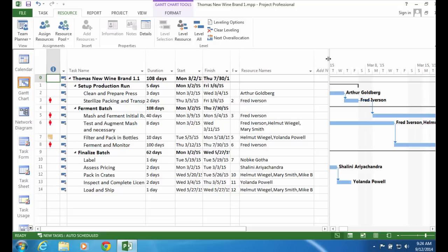Well, in the version you see on the video previous to this, I actually took my settings and told them to put all the over-allocation on the last thing scheduled to him, and so only one task showed up over-allocated. And that caused a little bit different scheduling, and it made a variation of about 34 days, 36 days in the end time.